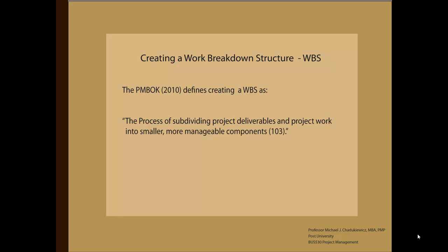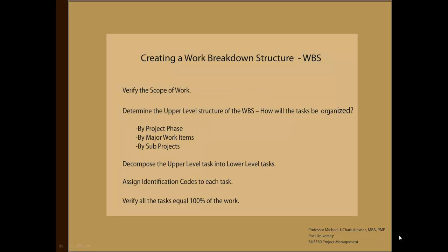So let's get started. The PMBOK defines creating a WBS as the process of subdividing project deliverables and project work into smaller, more manageable components. This slide is based on some suggestions presented in the PMBOK and some of my own experience in creating a WBS. The first step is to verify the scope of work. Second step is to determine the upper level structure of the WBS. In other words, how are we going to organize the tasks of the WBS?